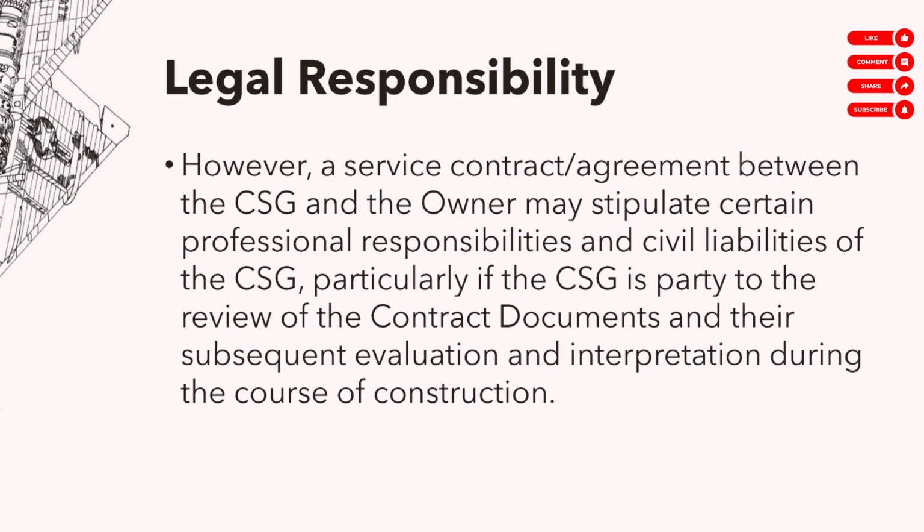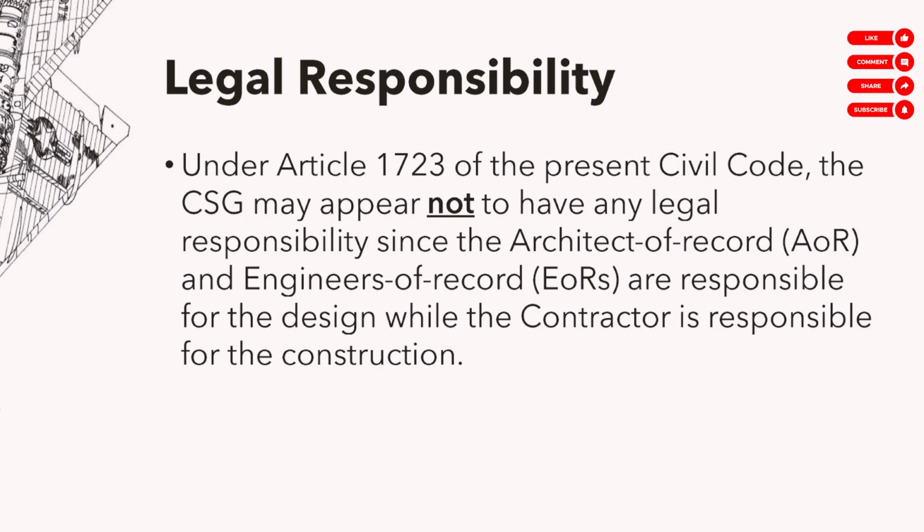Particularly if kasama daw ang CSG sa review of contract documents. Like, chinek naman ni CSG yung contract documents, kasali siya, tapos nakalagay pa sa kontrata na madadamay siya kapag nagka-civil liability yung consultant, then pwede siyang madamay. Okay, so that's what they're saying in the standards. Again, by default, walang civil liability, it appears na wala.